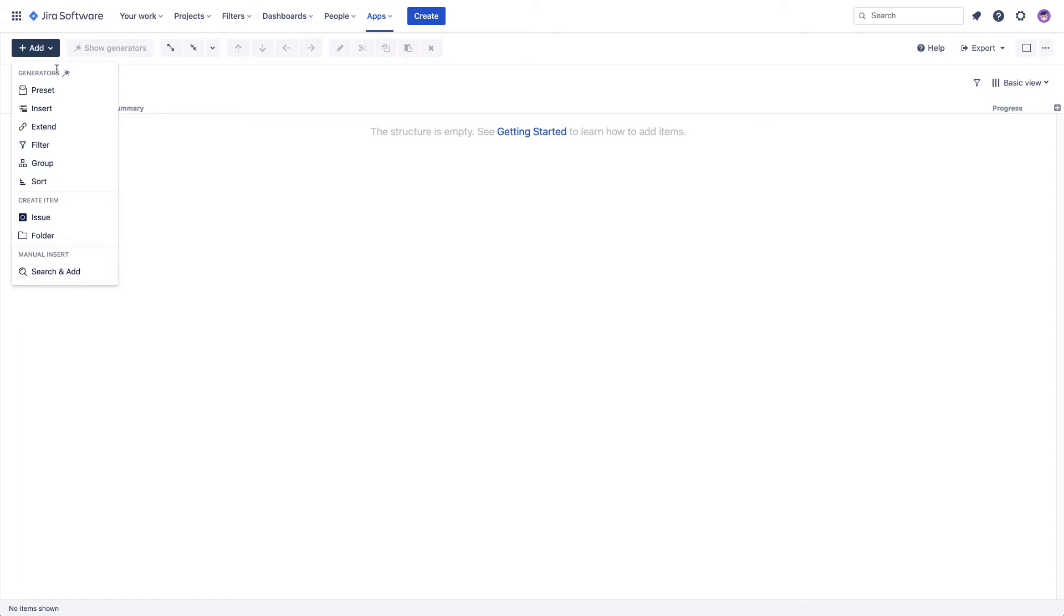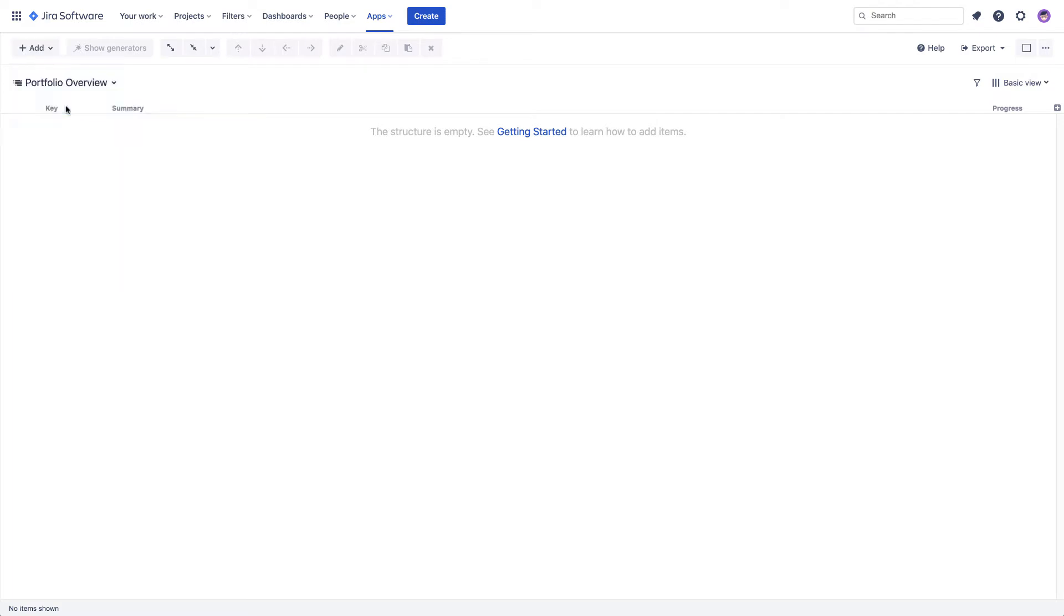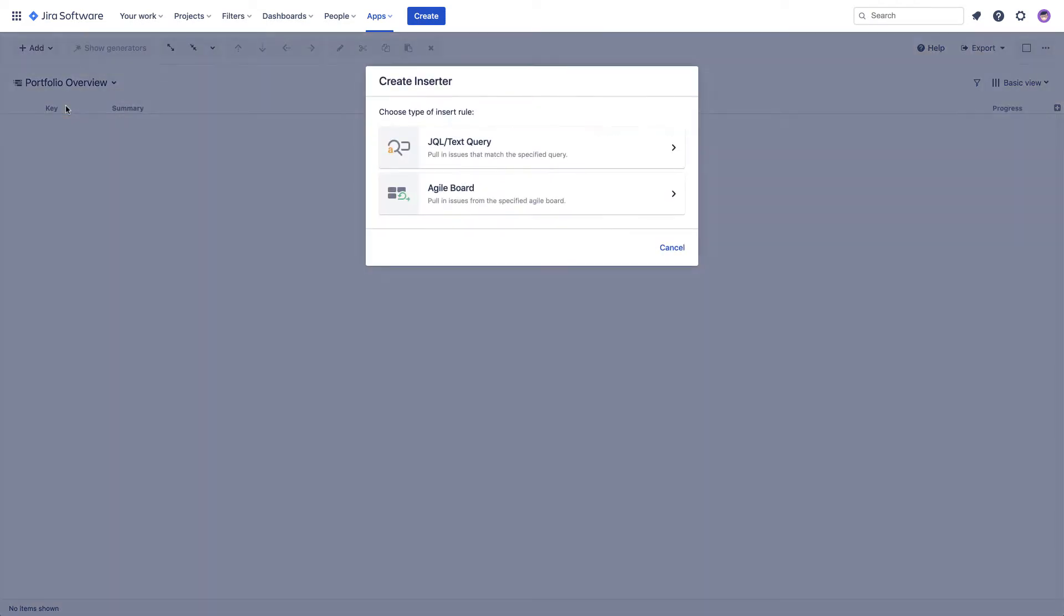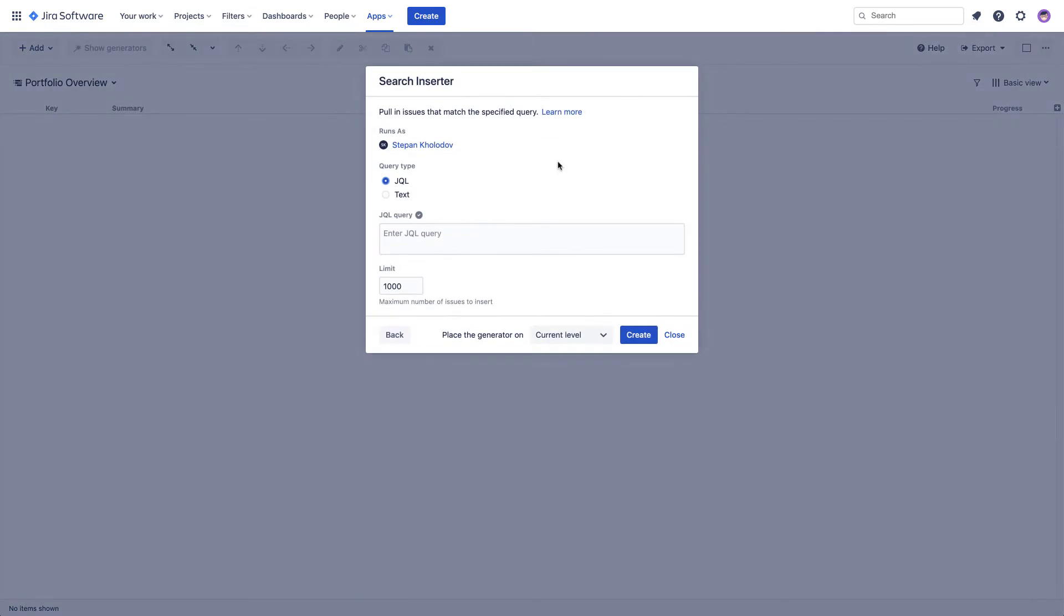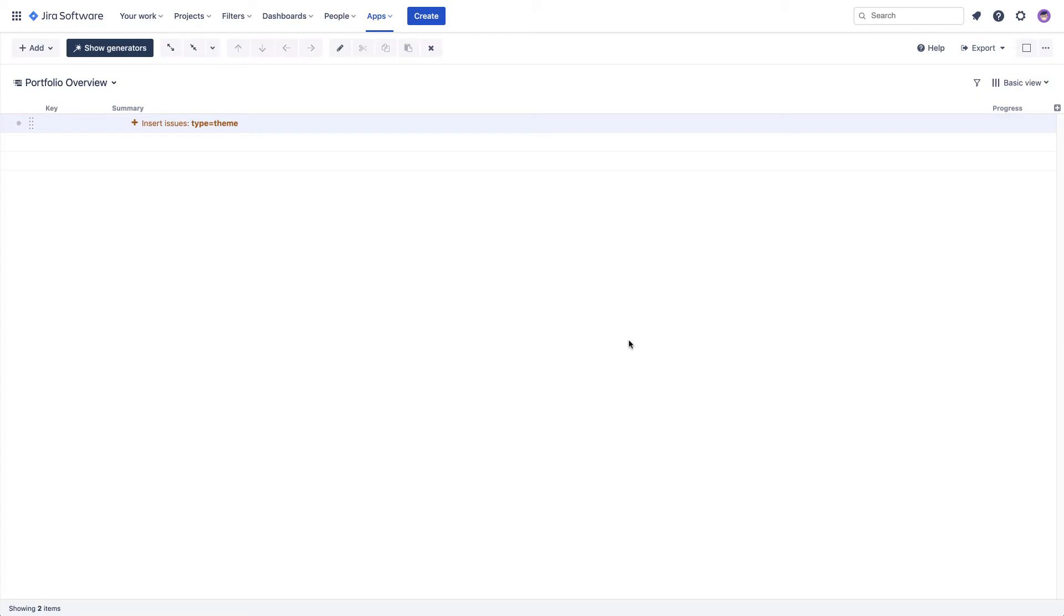Let's start by adding our top-level items. We can add all issues from a particular board or use a more flexible JQL option to define what issues we want to see. As we add the generator, we see the results of its work right away. As long as you have your structure open, it will automatically update itself in real-time based on changes in Jira.